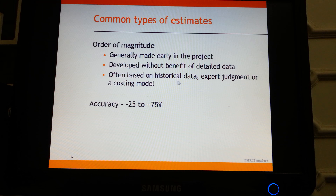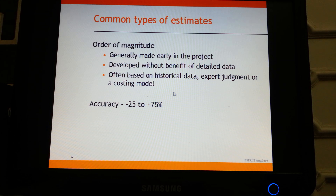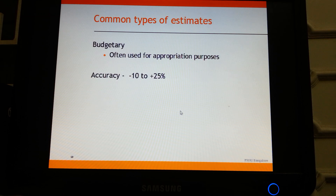Some common types of estimates: the order of magnitude estimate is generally made very early in the project, developed without the benefit of detailed data, and is often based on historical data, expert judgment, or a costing model. This is also known as a ballpark estimate and is very inaccurate — the expected accuracy level is minus 25 to plus 75 percent.